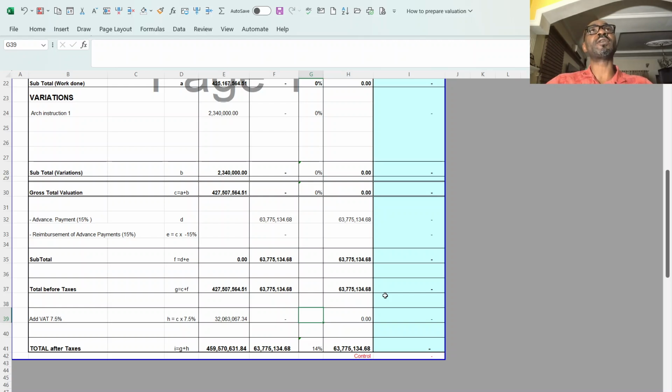Then the contractor's quantity surveyor will present an interim request for payment, which in turn the client's rep will assess and give his approval for payment, then payment will be made.